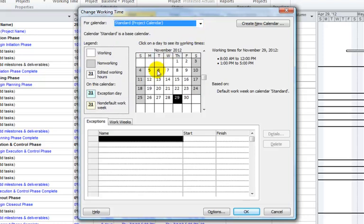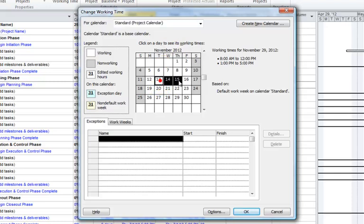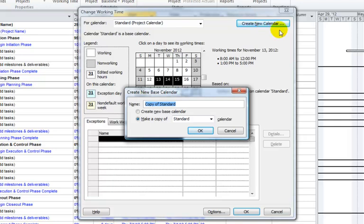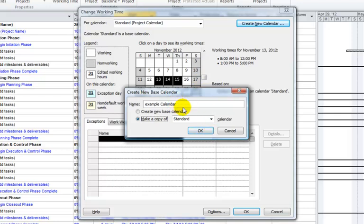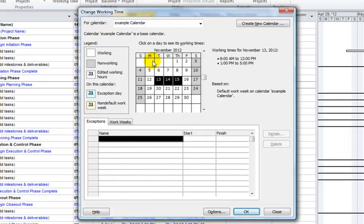The easiest way to edit a calendar or create a special calendar for your organization is to edit the existing calendar — select your days, define the exception, and put in the start and finish times. You can also create a whole new calendar by clicking the Create New Calendar button. When you click Create New, you can define a calendar name — we'll call this Example Calendar. You can create a whole new calendar or make a copy of the standard calendar. It's easier to start from the standard calendar because it already has exception days like Saturday and Sunday filled in. So start with the standard calendar, click OK, and now you're in the Example Calendar that mirrors the standard calendar.